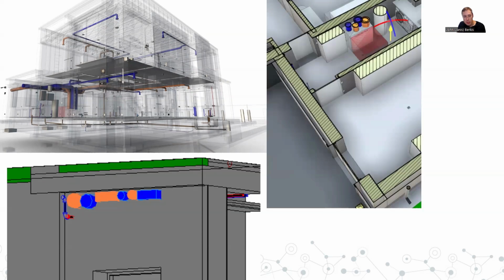One other example was installing the ventilation machine inside the building. By creating just a simple section, I looked at the box and realized it seems that the doors might be too small to fit in the machine. So I double checked, and I realized that to actually install the machine, you need bigger doors. So again, if this would be found out later during the construction when the device has arrived on site, well, it wouldn't be a good situation.